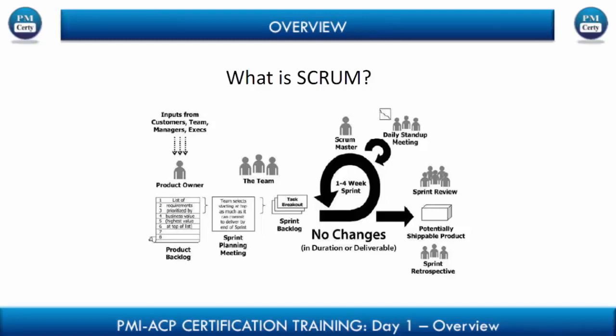Who should handle such a situation is the next question. The answer is typically not the product owner but the Scrum Master, who will intervene and tell the product owner, we will not accept these changes. We are in the middle of a sprint, so please go back and reprioritize the requirements for your next sprint and we'll take it up then. So important for us all to remember this part.